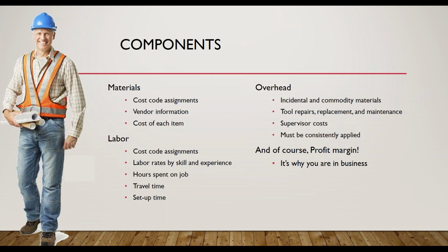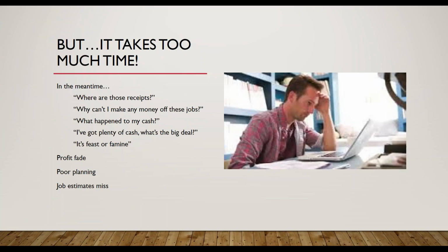It becomes crucial to track every expense and every hour in field reports. And by the way, daily is an excellent habit to get in if you've got jobs happening on a daily basis. It seems like a lot of work and a pain, and yes, it can be, but it really does pay off. So it does take time, especially to catch up if you haven't set up phase and cost codes, and more importantly, the processes and culture of tracking. Do not underestimate the importance of culture in changing a process.